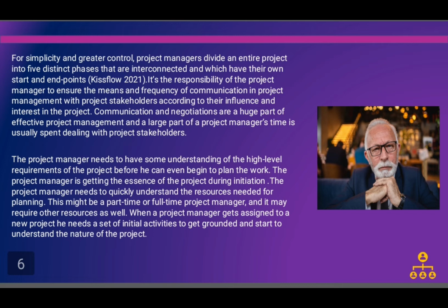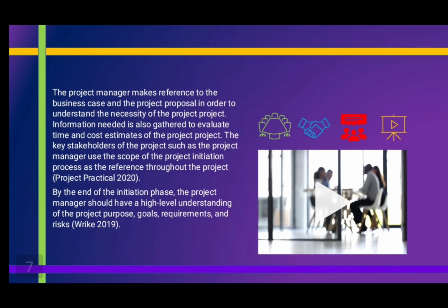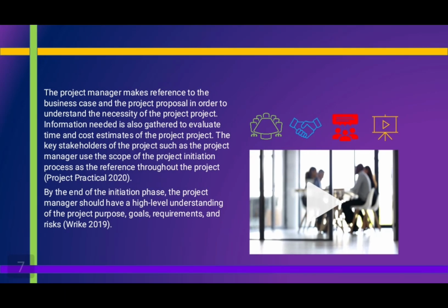When a project manager gets assigned to a new project, he needs a set of initial activities to get grounded and start to understand the nature of the project. The project manager makes reference to the business case and the project proposal in order to understand the necessity of the project. Information needed is also gathered to evaluate time and cost estimates of the project.